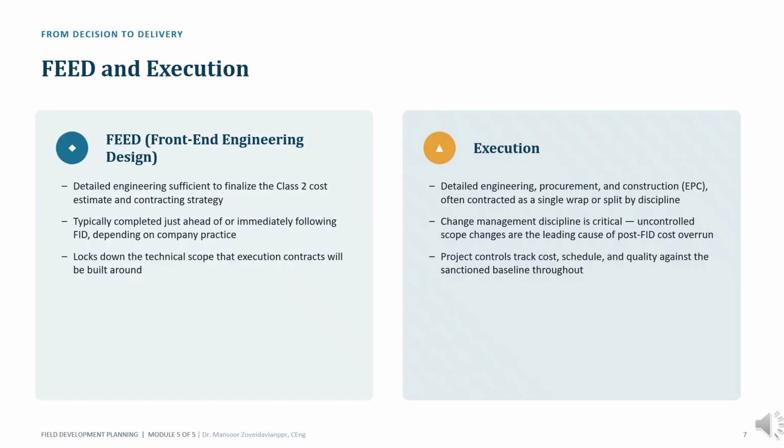Following FID, attention shifts from planning to delivery. FEED, or front-end engineering design, bridges the gap between concept selection and execution. The objective is to finalize technical scope, improve cost certainty, and establish the basis for contracting. Execution then includes detailed engineering, procurement, construction, drilling, commissioning, and startup activities.